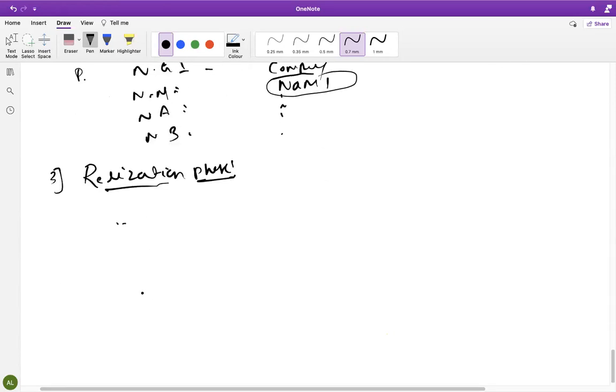In the realization phase, initial server installation will happen. Our development, quality and production servers will be there, and all these server installations will happen. Once the server is installed, whatever we have prepared in the business blueprint documents, we need to bring it to reality. Whatever we have promised in the business blueprint phase, we need to give into reality. That is the realization phase.